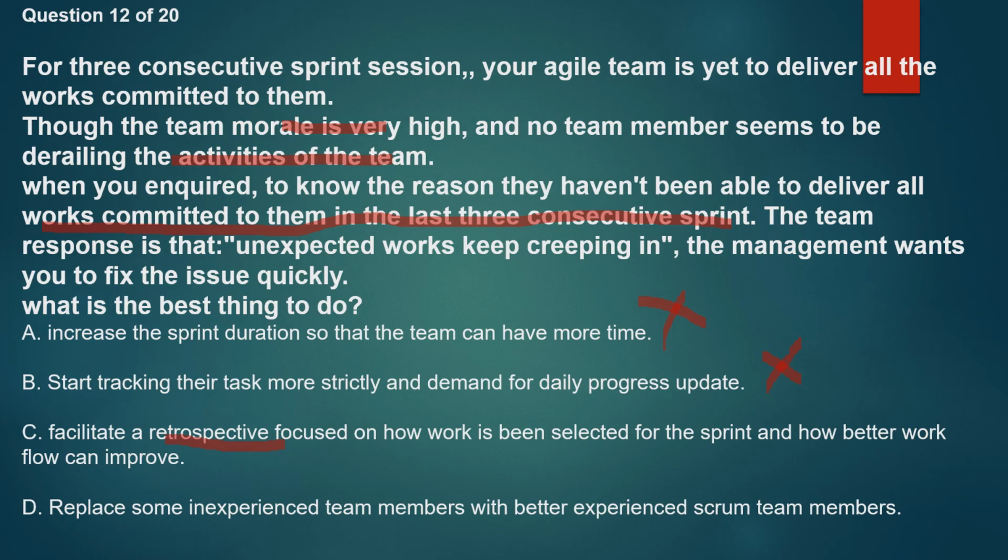These are important questions, and it is important for you to know that a retrospective is an in-house meeting. It's different from a review meeting. It's an in-house meeting attended by 3 parties: 1, the project team, 2, the product owner, 3, the Scrum Master or the project manager.